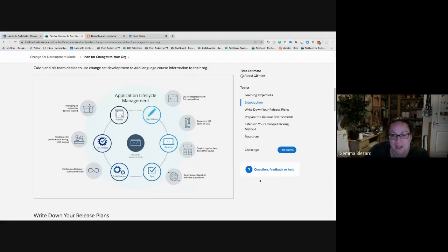So if I break that down, the word capture gives me a lot of creative license, because I can think about, okay, what are the possible ways that I could capture a lead for someone to follow up on? Well, a lead could visit the website, so I might need a web to lead form for them to put their details in. A lead could visit a website and be tracked through cookies, that they're visiting a website and they've accepted that those cookies exist to do that. So that's another route in. A person could phone in on the central switchboard and say, I'm interested in this and that. Can someone contact me, or can I speak to the right person? So that's another method. And that's just one sentence that has given me 3 potential things that I've got to configure for. The next thing is, how do I even track the fact that the follow-up needs to happen?